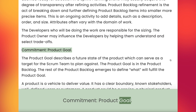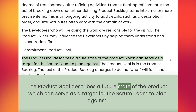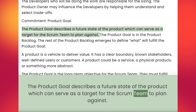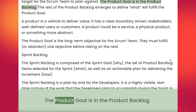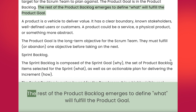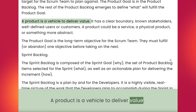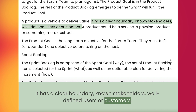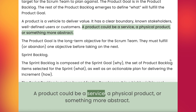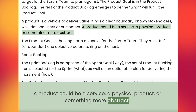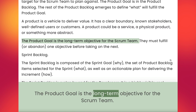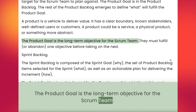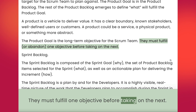Commitment: Product Goal. The product goal describes a future state of the product which can serve as a target for the Scrum team to plan against. The product goal is in the product backlog. The rest of the product backlog emerges to define what will fulfill the product goal. A product is a vehicle to deliver value; it has a clear boundary, known stakeholders, and well-defined users or customers. A product could be a service, a physical product, or something more abstract. The product goal is the long-term objective for the Scrum team. They must fulfill one objective before taking on the next.